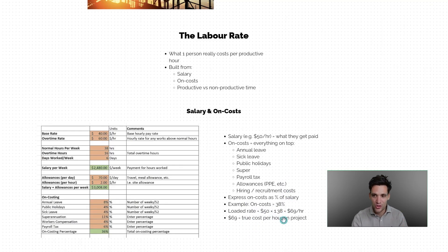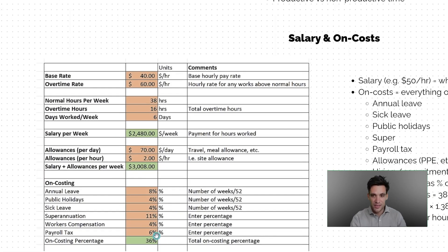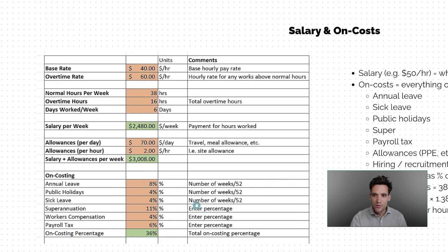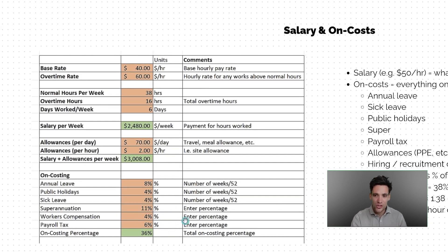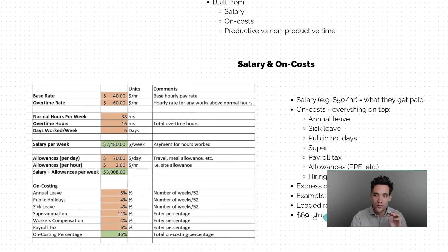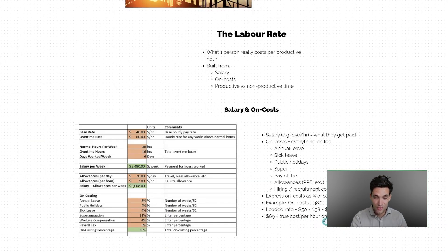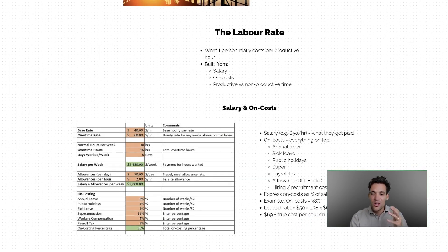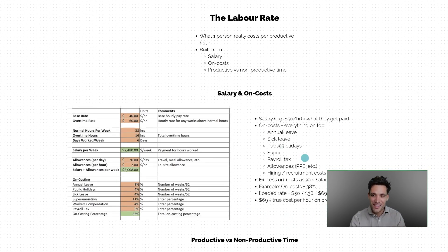This is referred to as the loaded cost rate. For example, if we factor in 8% for annual leave (four weeks out of 52), public holidays at 2 weeks per year equalling around 4%, sick leave at another two weeks per year, superannuation of 11%, workers' compensation of 4%, and payroll tax of 6%, we end up with an on-cost percentage of about 36%. So the true cost of that person ends up being around $69 per hour to the business — significantly more than their salary.